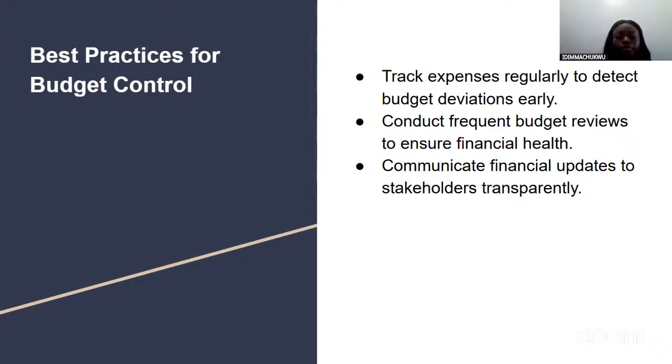Okay, the best is actually the bottom-up. Before it gives you a budget, you will have to list out every single task that needs to be completed to achieve the goal of the project, and then estimate the cost for each of them. That makes it more accurate. It's not 100% accurate, because things can happen, right? But at least it's 90% accurate. So it's better compared to the others.